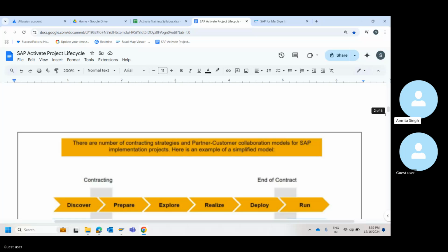So they'll come back to us, and then we will demonstrate, make them understand, and let them know why we need whatever we are asking for. We will basically justify what we are needing, and then the client agrees. When the client agrees, we will prepare the SOW and a contract, and it will be signed. Then it will go to the PMO, and the PMO will assign a project manager after completion of everything.